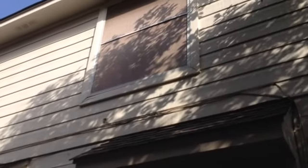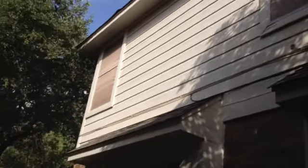You can see the window trim there that's rotten, so that will all become Hardie plank. We're wrapping all windows and doors on the home, including the couple windows and door and the atrium off the master that I mentioned earlier. So all of this, again, needs to be wrapped in Hardie, windows all trimmed.